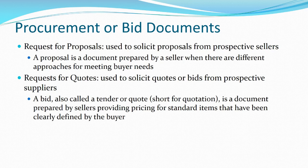A couple of points here. A request for proposals can contain a request for bids or not. If you're requesting proposals, you may not be evaluating just on cost. If you are evaluating on cost, you can put the request for bids in the request for proposal, or separately. Generally speaking, a good sound business practice, an ethical practice, is to require blind bids. And that means, for example, you have companies submitting bids that are sealed, whether they are digitally sealed and encrypted, or they're literally handing you an envelope so that you can evaluate them all at the same time, and that there's no chance for somebody to have seen the bids to provide feedback.